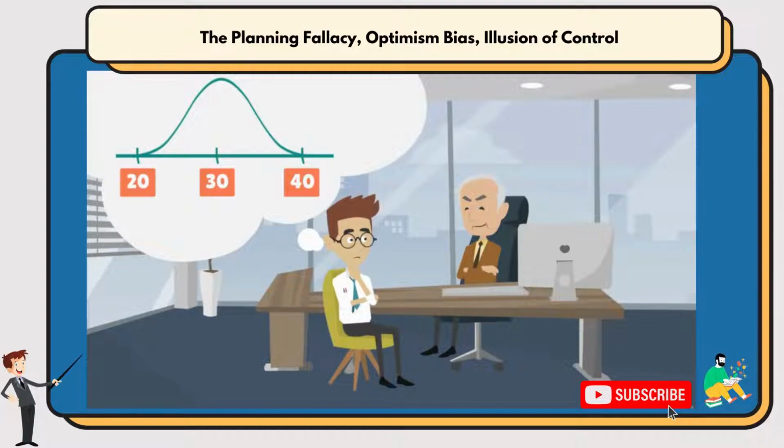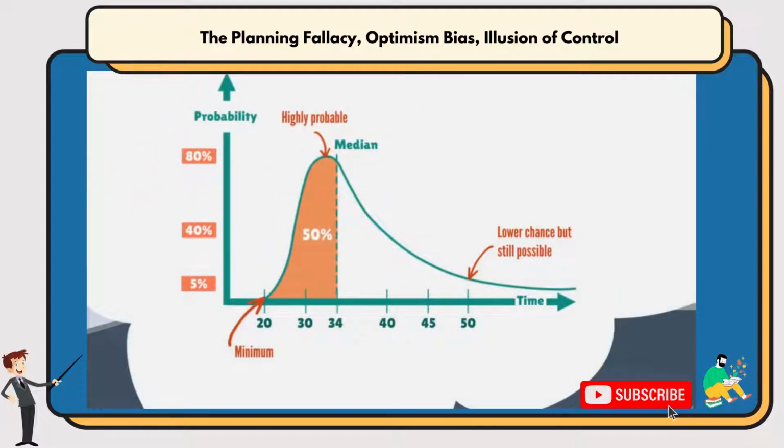So with this new knowledge in mind, we need to readjust the graph we made last time. All these possible slowdowns he forgot when doing the estimation need to be added to the right of our graph, so it reflects reality better. If you look at the graph now, you will notice that 40 minutes is really nowhere near the maximum time it could take Jimmy. So if you stretch the graph to account for the delays Jimmy could have, as well as the likelihood of those things happening, it will look something like this, with the average time of Jimmy's journey sitting further to the right also.